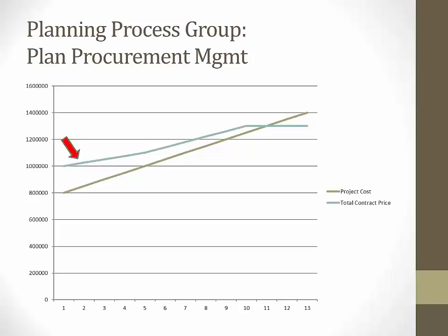If you remember in the example, the buyer share ratio was 50% for underruns instead of 80%. This is to incent the contractor to produce efficiently and effectively by allowing them to earn greater profits by keeping their costs lower. But you also benefit by not paying as much.